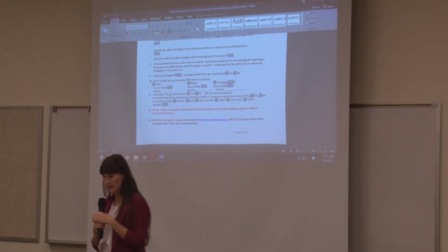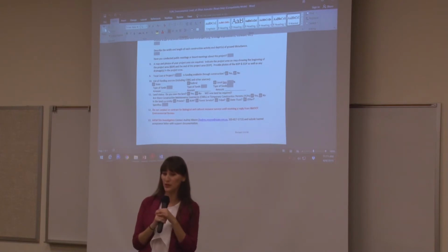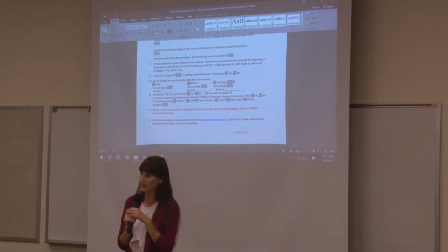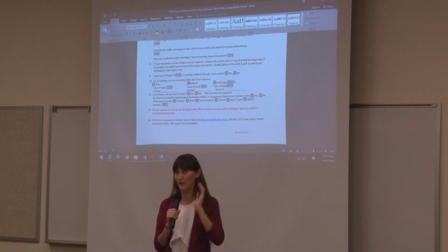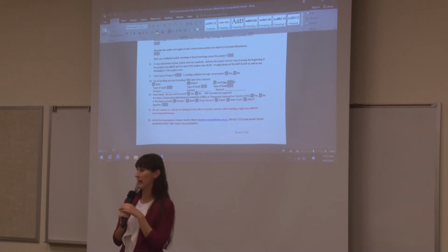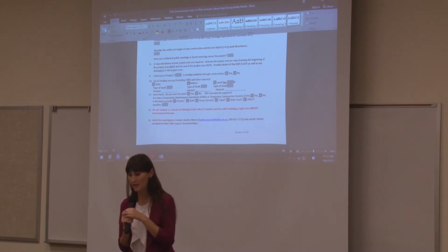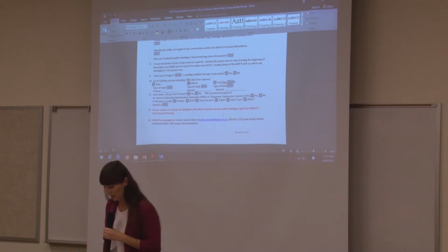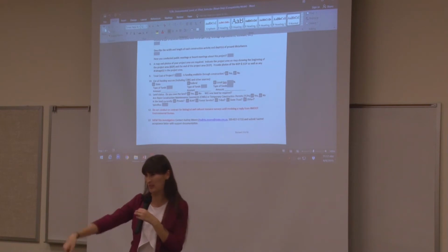I like to tell people at this point to add a little bit of contingency into your design services cost estimate, because sometimes things come up that you would not expect through environmental. And the story that I like to tell for this is I was involved in a project in an unnamed district with an unnamed TLPA. They wanted to build a path through a park that they owned. There happened to be a dead tree in this park, right where they wanted to build the path. They decided, we're going to cut that dead tree down, no big deal, just remove it.